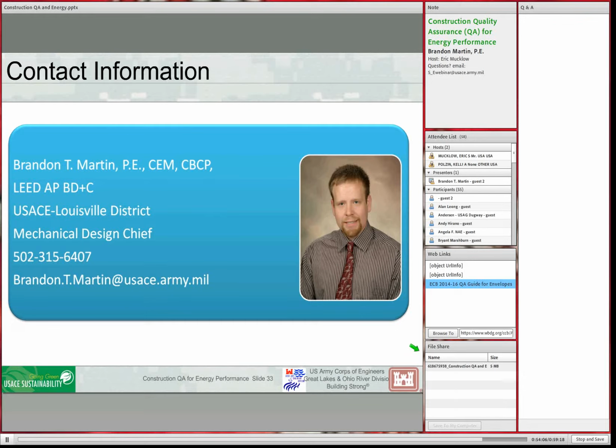And you can't incorporate that level of maintenance into your life cycle cost analysis. You really have to assume that they're going to take care of the system the way it needs to be taken care of. And the only data I can think of that's easy to get to is RS Means. ASHRAE has a database that has various data in it, but there's not a lot of data points, so it's